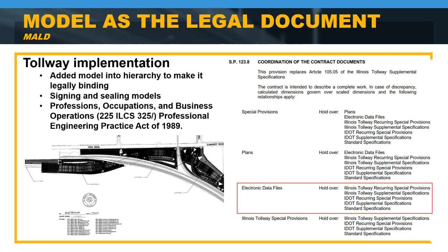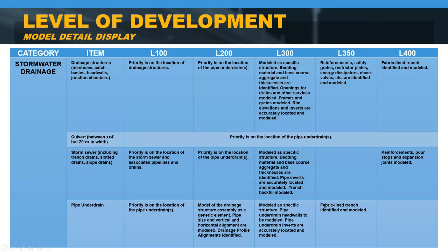Next slide. So our first few pilot projects had a plethora of lessons learned, as do most. We hit many hurdles, but the earliest was related to the detail a designer needed to go into for each milestone submittal. We found often that the designer was taking the model farther than preferred due to the inevitable design changes in the progression. This caused some avoidable rework that may not have occurred if we had been more proactive in developing detailed scopes early on.